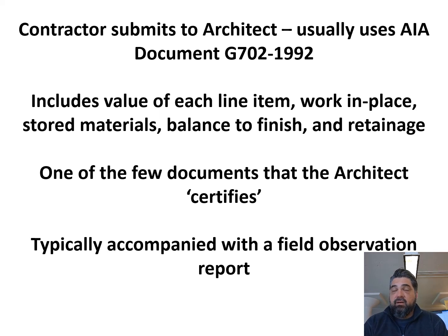It's still sitting in the subcontractor's warehouse, and so one, it's not insured, and two, it could end up getting used for another project, and then all of a sudden the subcontractor runs out of money or something, and then no longer has that product to be able to use for the project. And while that sounds far-fetched, I've actually seen it happen before.